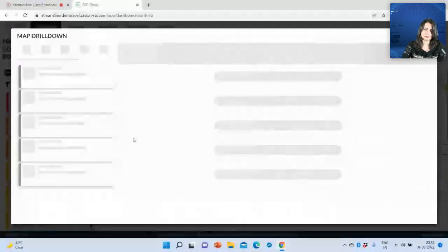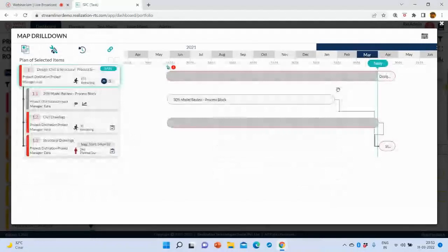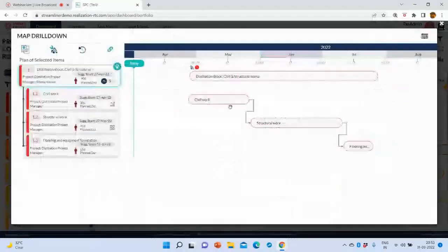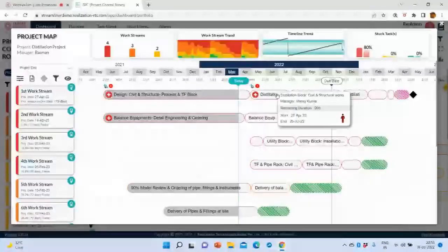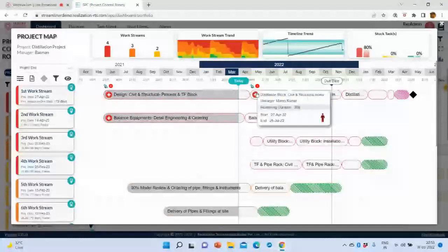So go inside the drawings, right? There are civil drawings and then the structural drawings. If I go inside the work of the civil and structural contractor, there is civil works and structural works, and then some flooring and equipment foundation works, right? If we think of the engineer consultant and the contractor, then they can work in the dots and try to work in an overlap fashion, which is the unobvious integration point problem that Sanjeev had shown before.